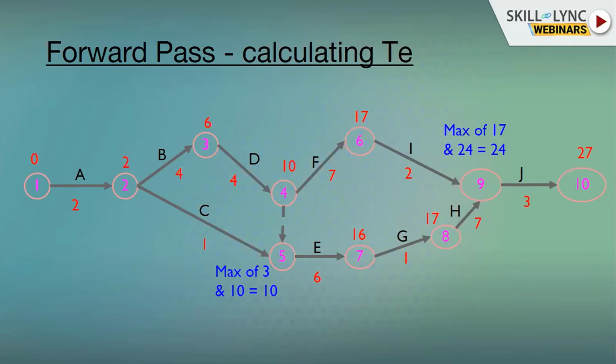It is a very simple concept, easy to remember. In the forward pass, whenever the paths are converging, whatever the maximum time is coming, take that.